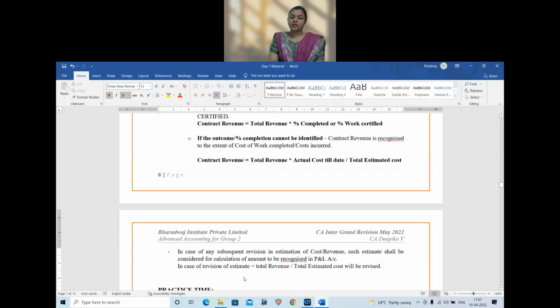The house 50 lakhs. No, even in fixed price contracts, we need not complete it in the same fixed price. We can have extension of price also. We can say if the prices are increasing, you will get a variation claim or escalation claim like that. But the idea is when you start the contract, you know your expected revenue. Right? So we start with the questions.